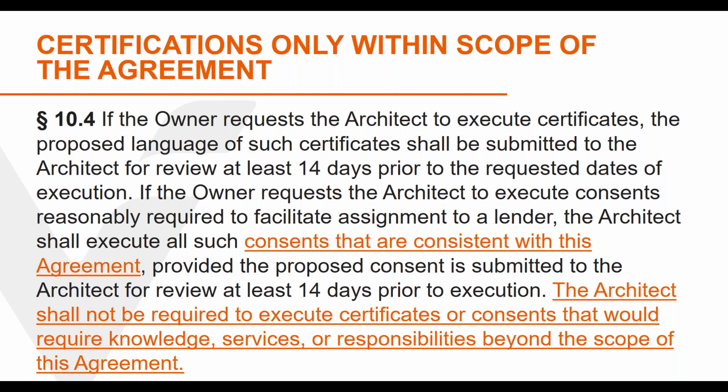Certifications can be a minefield unless the certification is limited to what the design professional knows as a fact related to the services provided, or can express a professional opinion based on the information available because of the services. This provision has been expanded in each edition, first by adding the "that are consistent with this agreement" language, and more recently with the absolute prohibition on any certificates or consents that would require knowledge, services, or responsibilities beyond the